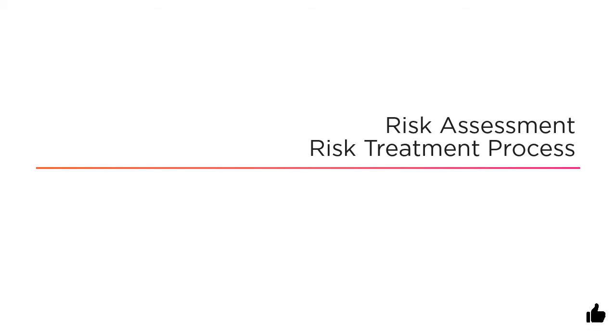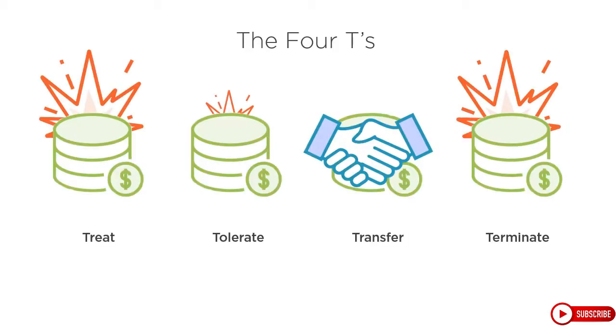At this point in the risk assessment process, we have identified threat scenarios, scored the impact, and now are looking to take those medium and high risks and mitigate them to an acceptable level. Not everything, even high risks, requires an immediate "let's throw money at the problem until it goes away" reaction. We're going to look at 4 alternative ways to mitigate risks. The 4 T's: treatment, tolerate, transfer, and terminate.